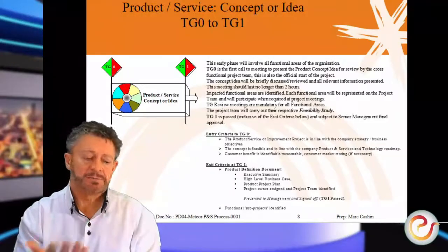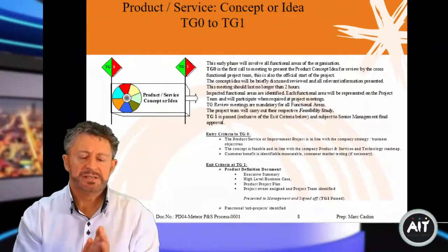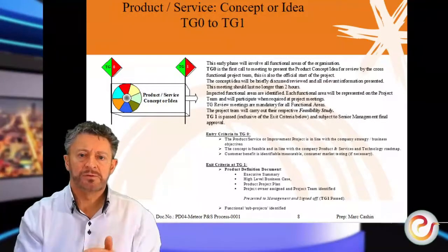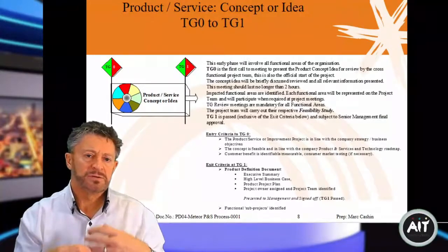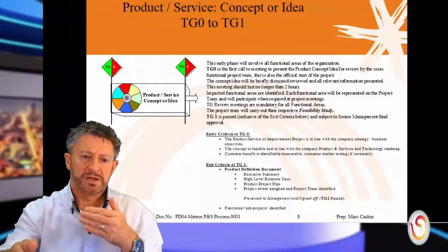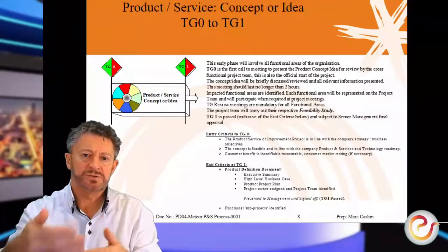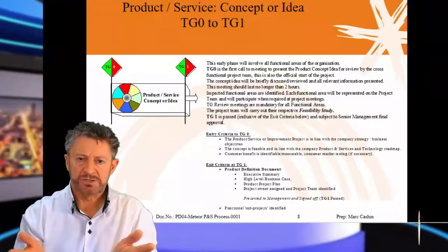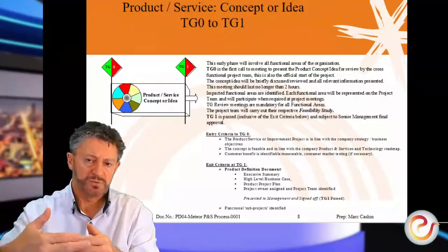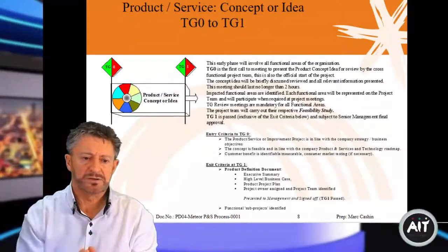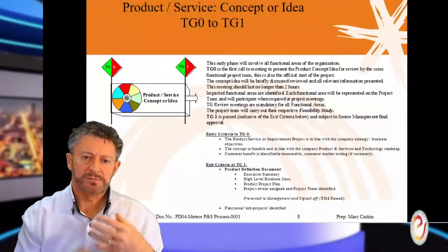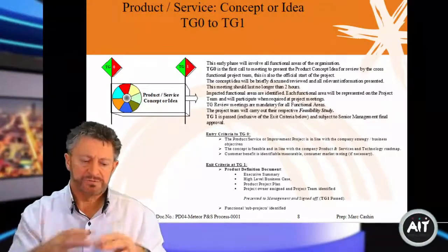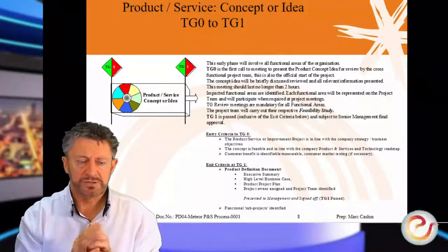And like, for example, if we had this new products and services, this is going to take us 11 weeks to introduce. The HR people say, okay, if we're all in agreement then on this, we know that in 11 weeks, we have to have our customer care people trained in this new. So we need to start our work maybe in week 7 and preparing manuals and operational documents such that customer care will be able to support the product when it's released to the customer. Or if we needed to train any people in particular technology during the implementation of it, that's what their brief. So they went off on their little HR version of the project.